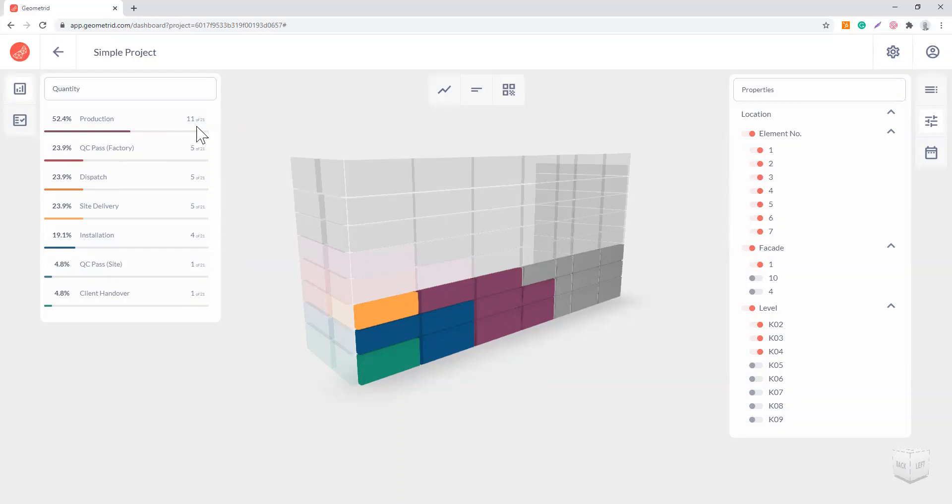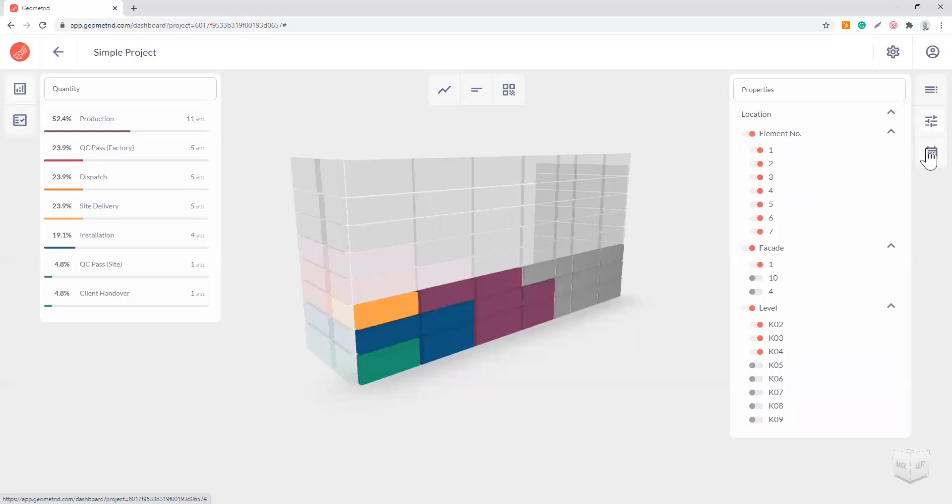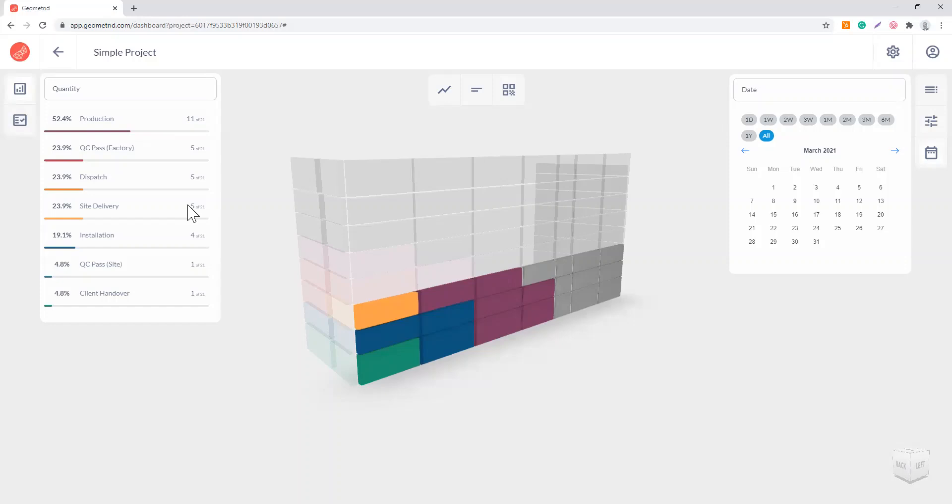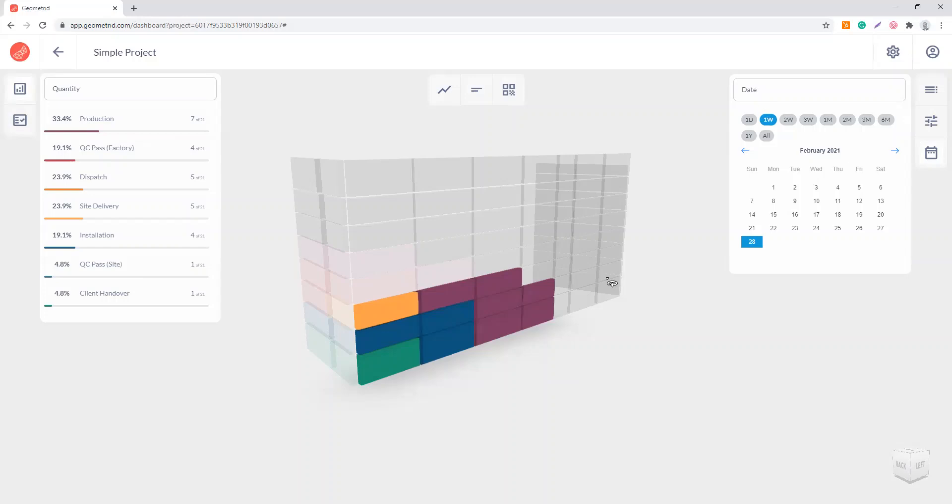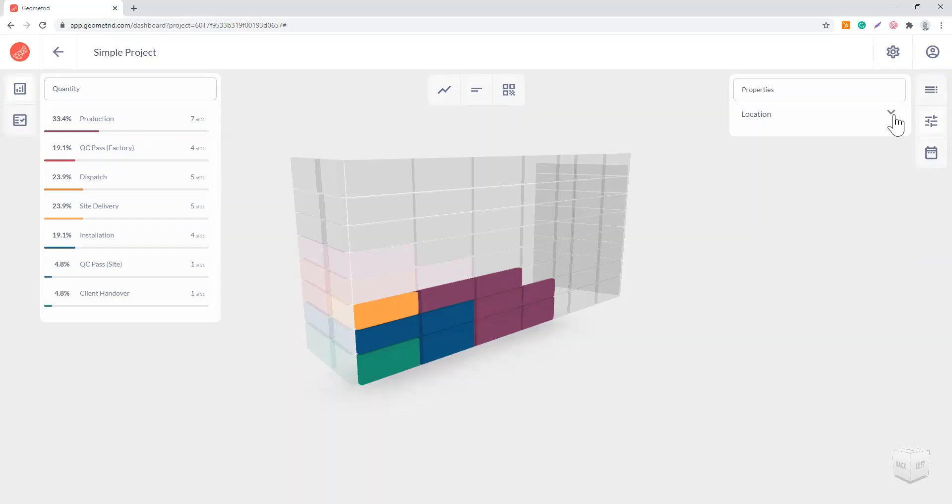There are 21 elements in facade one on these three levels. I can then print a separate progress report or a separate summary or even separate QR codes just for this selection. You can even combine the filters. You can say, I want to see what's going on for this selection in terms of progress but only over the last week. Then your selection is going to be narrowed down even further, and you can say, give me the progress summary for this selection over the last week. You will get all the items that are done in the stages that you have also left in this selection.